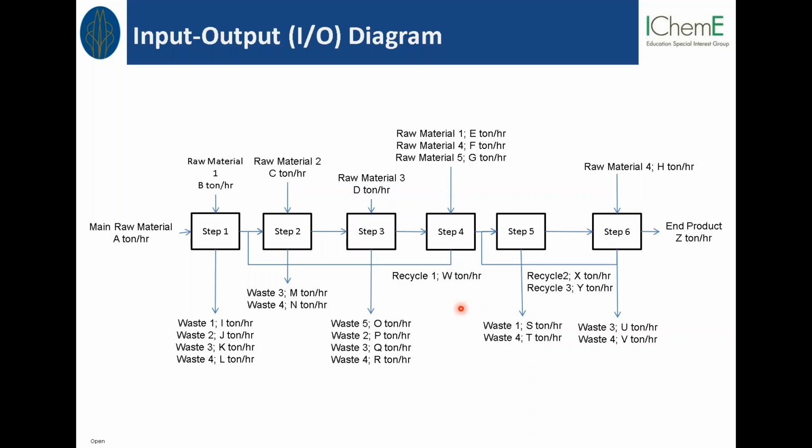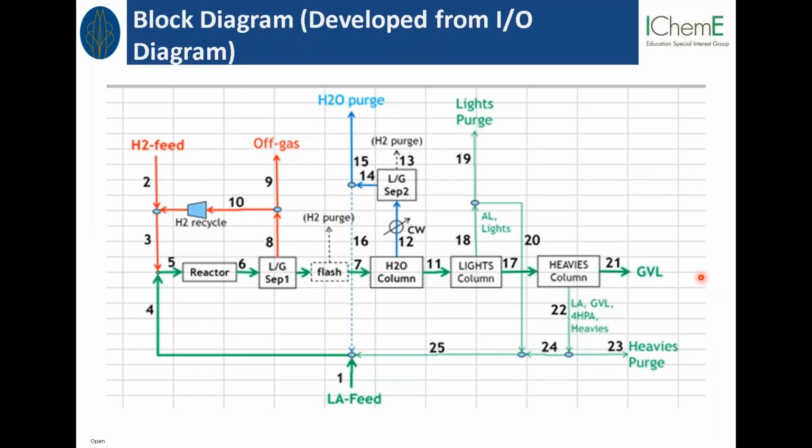And then we can have a list of these many 10 or 20 processes, depending on how many steps. And then we can quickly calculate the economic potential zero, and make them in descending order. So the processes on the top of the list would be the preferred ones, and the ones on the bottom of the list would be the ones that we're going to discard. So from this one, we move on to the next stage.